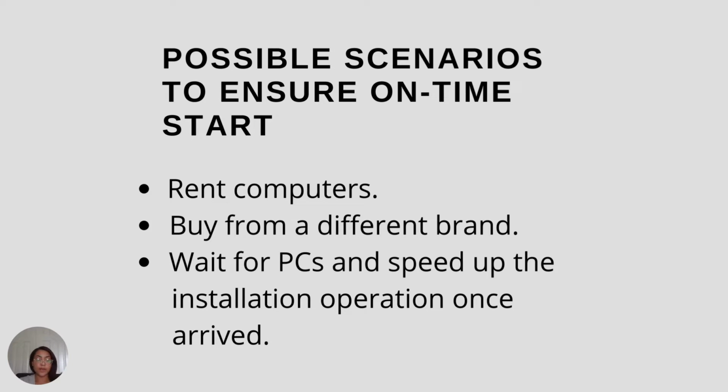Or we can wait for the PCs and speed up the installation operation once they've arrived. Whether this means hiring some more staff or paying the staff that we already hired overtime to get this done within 3 days, which would be kind of tight, but is an option.